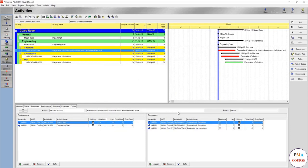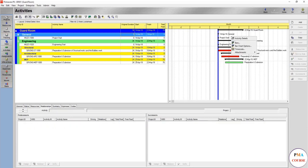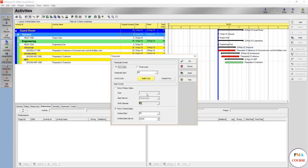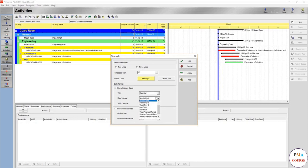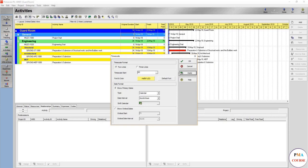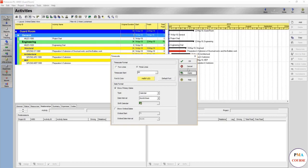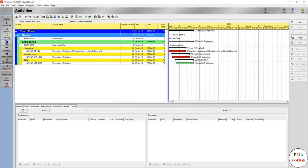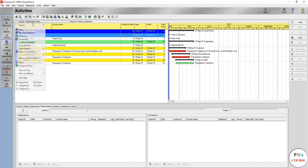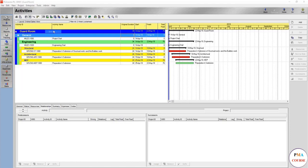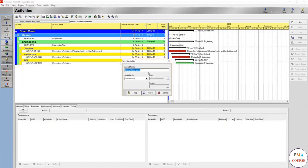We might also change the time scale to show primary dates. We'd like to say month, week, and three lines. And here it is, so we have everything ready and you would like to save this one as two weeks look ahead schedule.